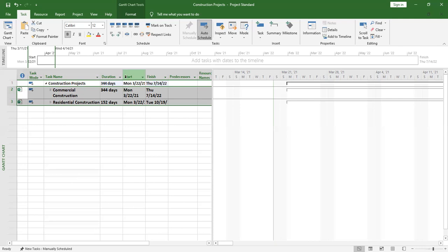I can give you a simple example. If we have 1 week to accomplish 2 tasks that are going to run concurrently, you may find that one task has 3 days, then another one has 5 days, but they are all starting on Monday. So at the end of the day, on Friday, when I want to see how long I have taken to accomplish these 2 concurrent tasks, it will not be 5 plus 3.